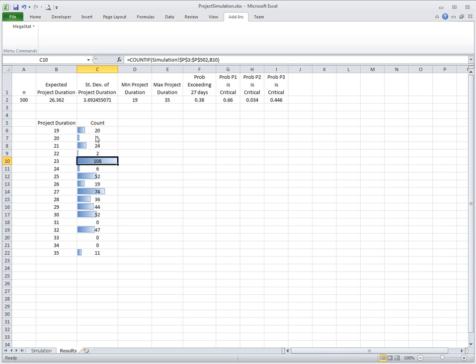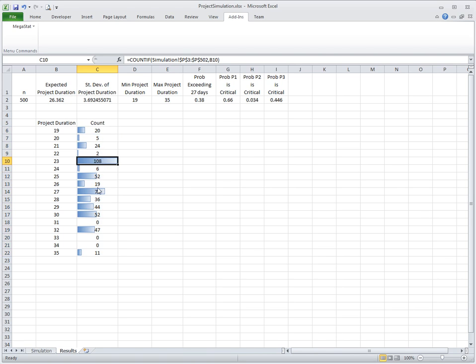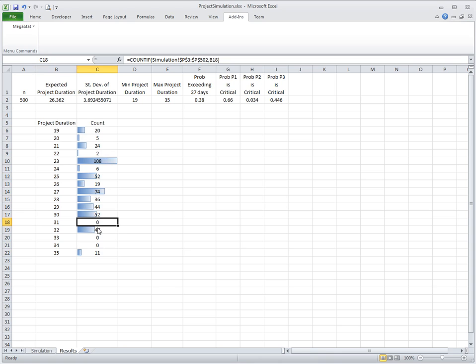We can see that the distribution of this project duration is not really normal. Assuming that it is normally distributed is an incorrect assumption, because it is some kind of uneven distribution with peaks at 23 days, 25, 27 perhaps. It never is 31 days, even though it can go up to 35 days.